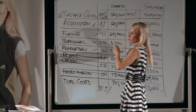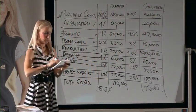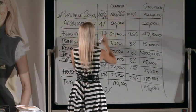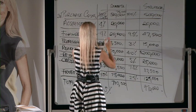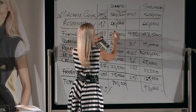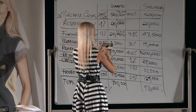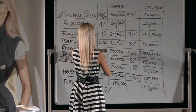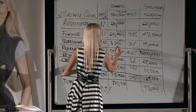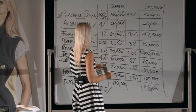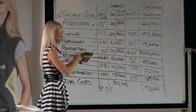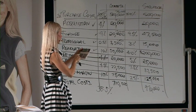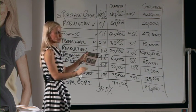Let me illustrate that. On a $390,000 house: $390,000 times 20% is $78,000 deposit. Acquisition costs — $390,000 times 4% equals $15,600. Professional costs — $390,000 times 0.5% equals $1,950. Renovation cost — $390,000 times 10% equals $39,000. No cost for resale, capital gains, or profit margin. If we tally that up: $78,000 plus $15,600 plus $15,600 plus $1,950 plus $150,000 — it should equate to $150,000.